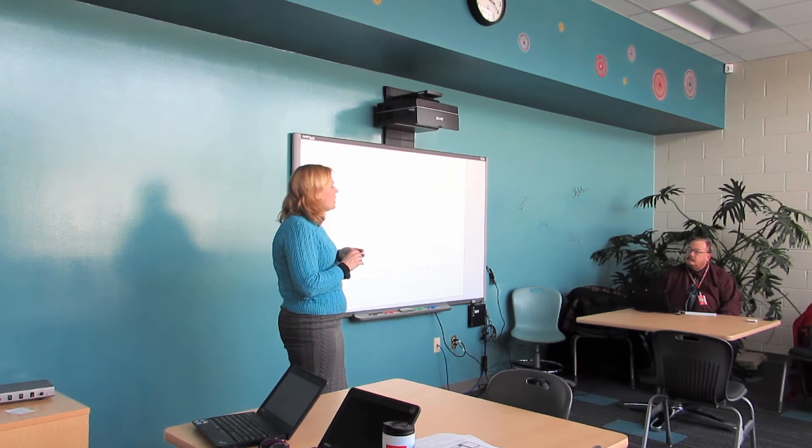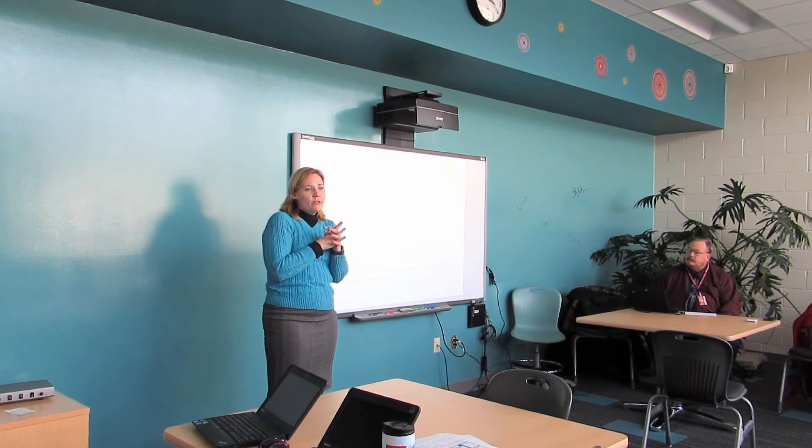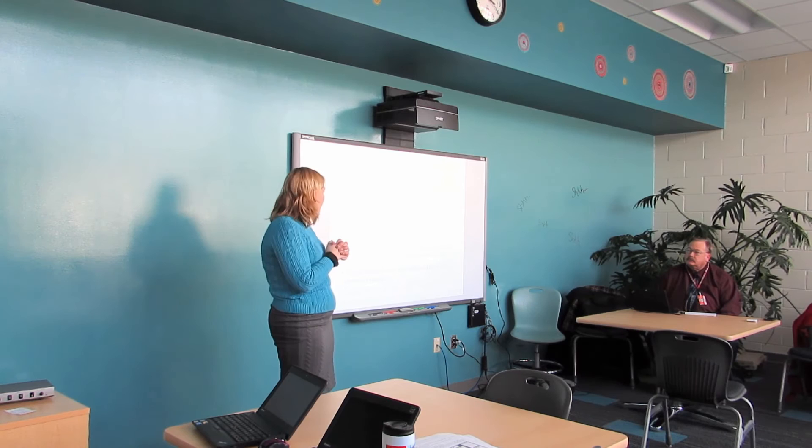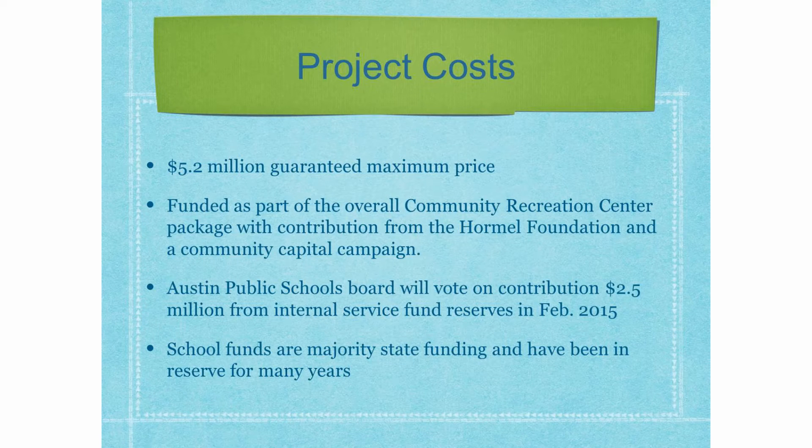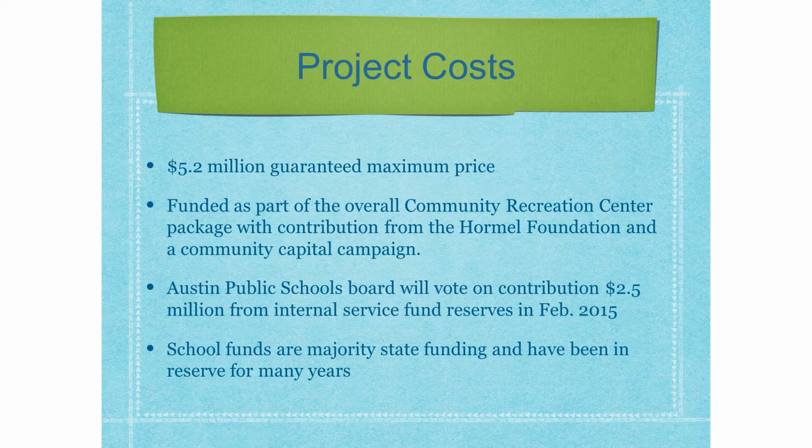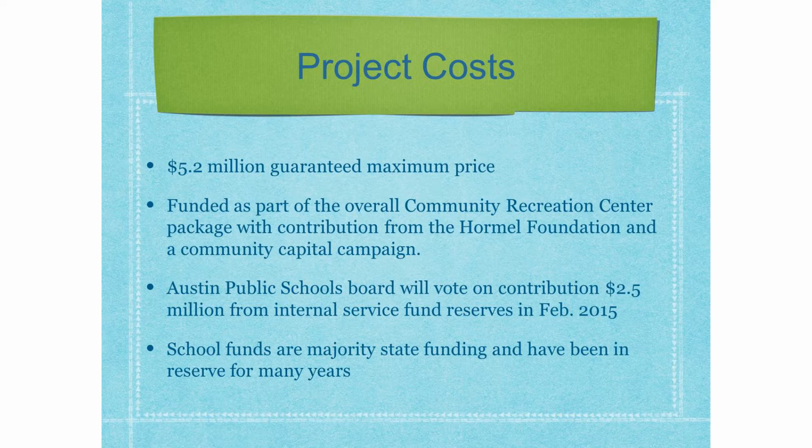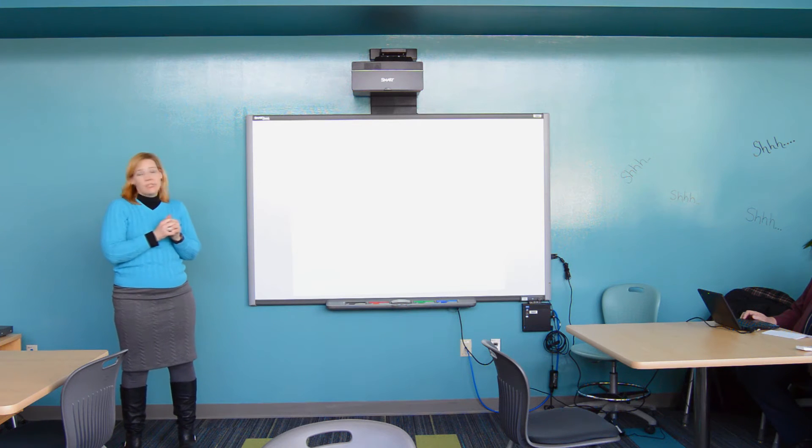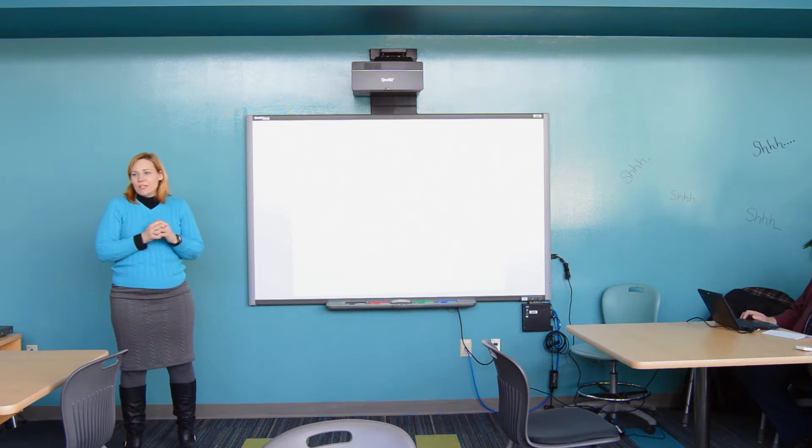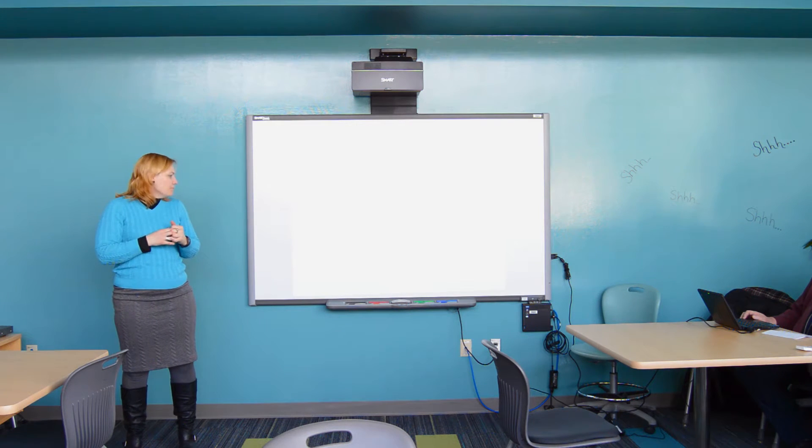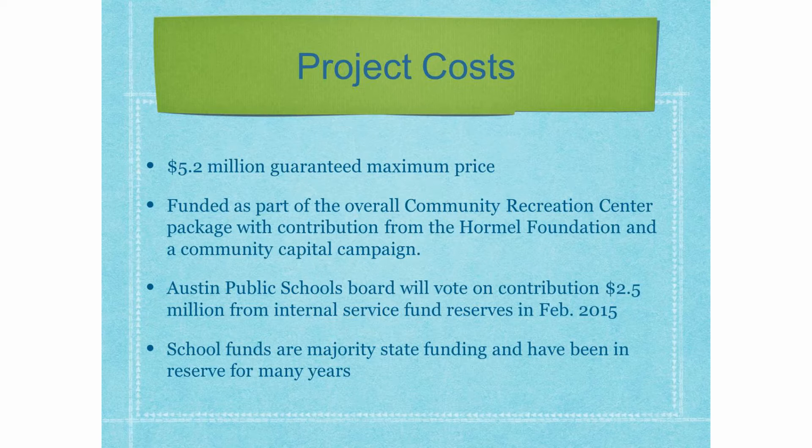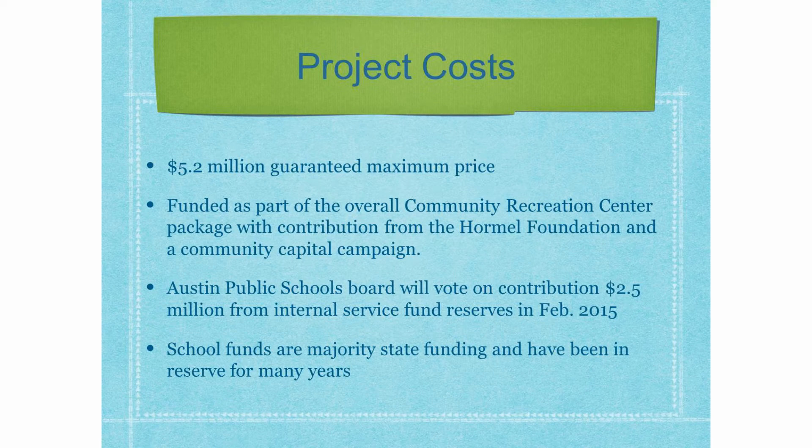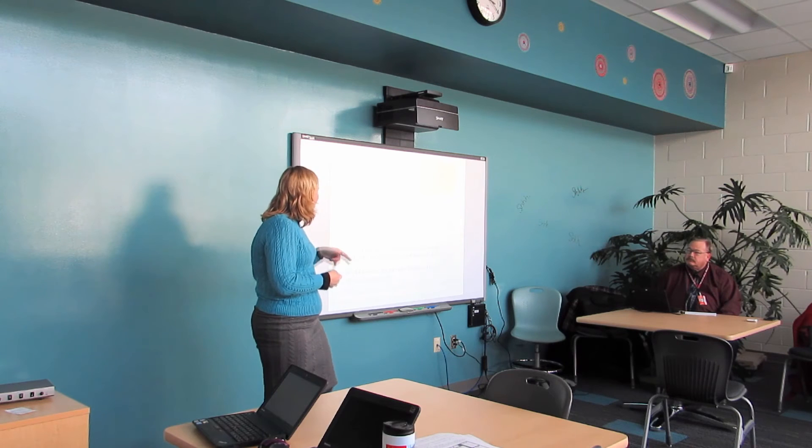Project costs. It's a $5.2 million guaranteed maximum price. It's funded as part of the overall community recreation center package within Vision 2020. And, as I said, the school is contributing funds and they come from an internal services reserve. And, Superintendent Crenz will say a little bit more about that. But, the school funds are majority state funding that was set aside in this reserve to prevent the state from pulling it back out many years ago.